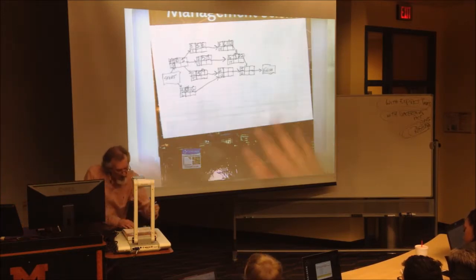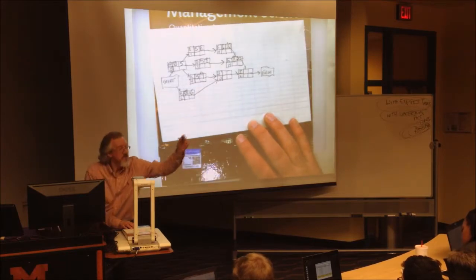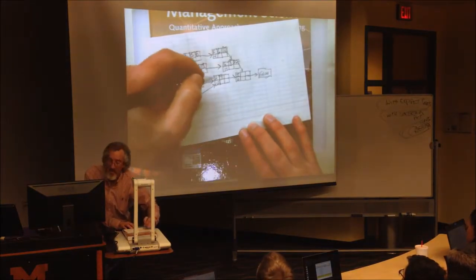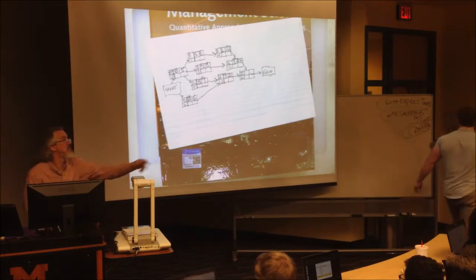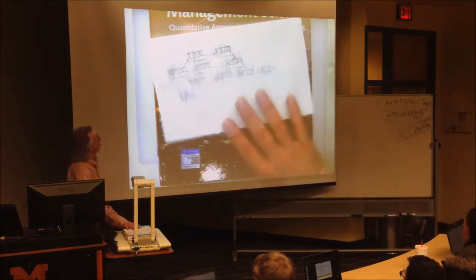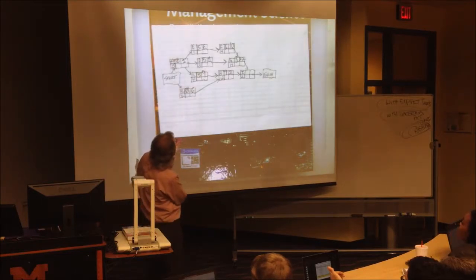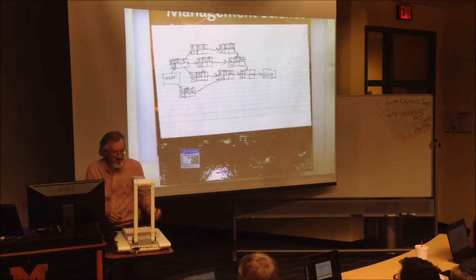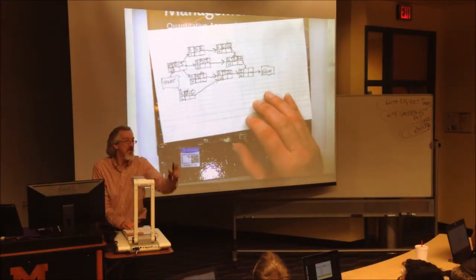So H can start as early as day what? 9. Takes 12 days. We're at 21. You're going to watch this recording. I don't want you to miss it. You got it? Was it G like that too? Oh, G is preceded by 2 activities. I missed that. Why didn't anybody catch that? Jason, you did. If there were extra credit, I'd give it to Katie.